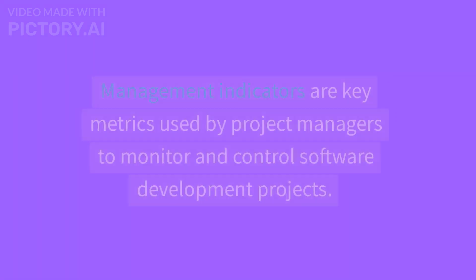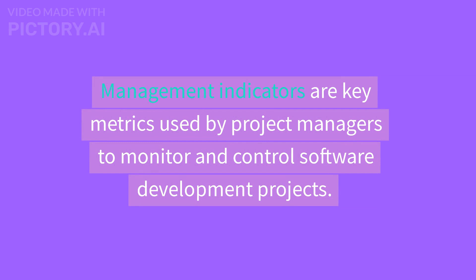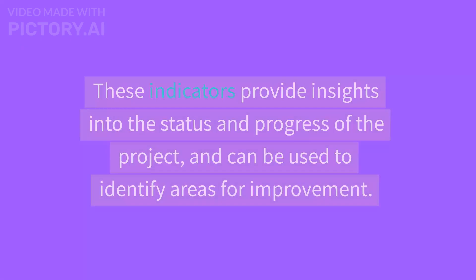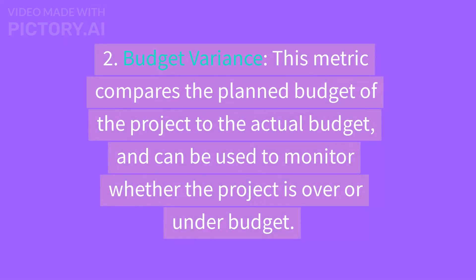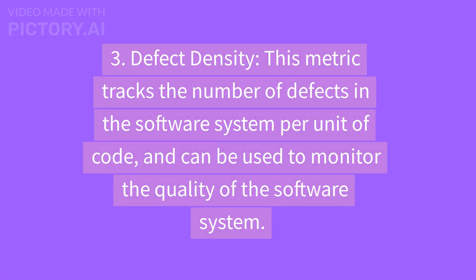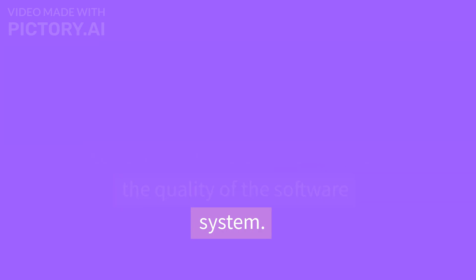Management Indicators are key metrics used by project managers to monitor and control software development projects, providing insights into the status and progress of the project. Some examples include: 1. Schedule Variance — compares the planned schedule to the actual schedule, to monitor whether the project is ahead of or behind schedule. 2. Budget Variance — compares the planned budget to the actual budget, to monitor whether the project is over or under budget. 3. Defect Density — tracks the number of defects per unit of code to monitor the quality of the software system.